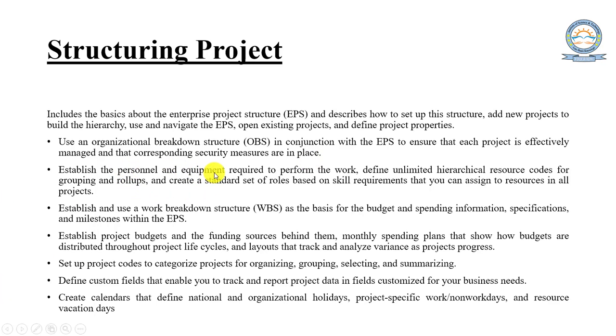Establish the personnel and equipment required to perform the work. Define unlimited hierarchical resource codes for grouping and roll-ups, and create a standard set of roles based on skill requirements that you can assign to resources in all projects.